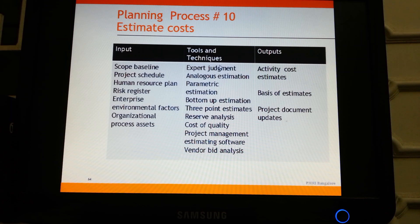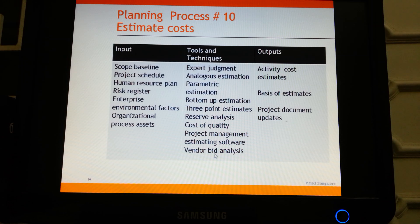The tools and techniques used for cost estimation are expert judgment, analogous estimation, parametric estimation, bottom-up estimation, three-point estimates, reserve analysis, cost of quality, project management estimating software, and vendor bid analysis. The outputs are the activity cost estimates, the basis of estimates including assumptions, and project document updates.